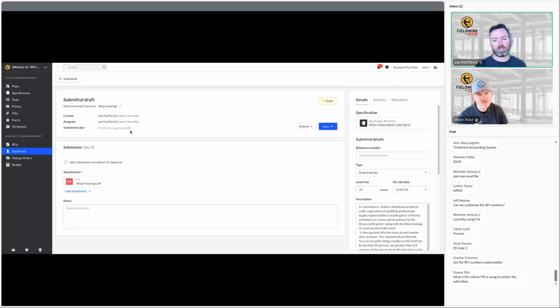So it does suggest a submit-by time based on the on-site date minus the weeks, minus the 2-week review. So it's a little helpful there if it's relevant for you. But we'll go ahead and submit this for approval.